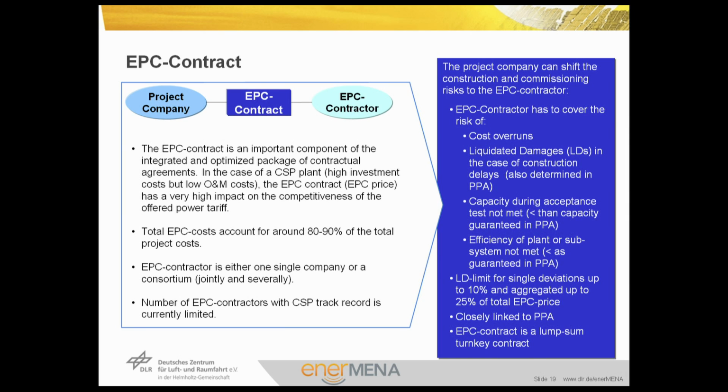So it is between the project company and the EPC contractor. The EPC contract is an important component of the integrated and optimized package of the contractual agreements. It should be arranged back-to-back with the power purchase agreement, as mentioned, to be the backbone of the project. The EPC contract price has a very high impact on the competitiveness of the offered power tariff.